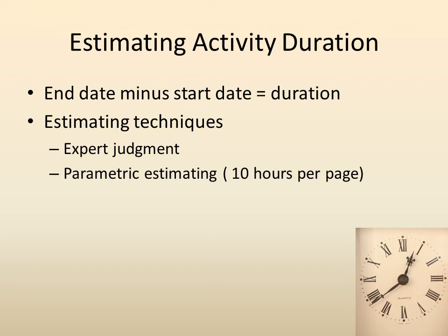experts might say, I usually count on 10 hours per page. That's a type of parametric estimating where we determine a particular kind of measurement. Software development is typically a certain number of lines of code or objects in a certain time frame.